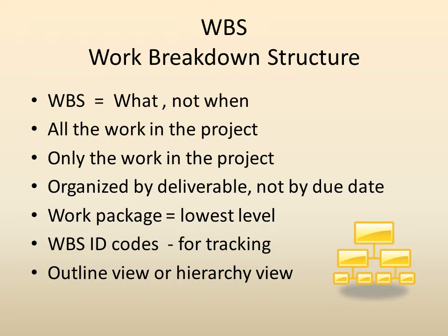Down at the lowest level of the work breakdown structure, we have something called a work package, and that's the very lowest level. So for example, something that might take a week and one person could do it, and might be our smallest level. Or on a smaller project, it might be something that takes a few hours and one person to do.